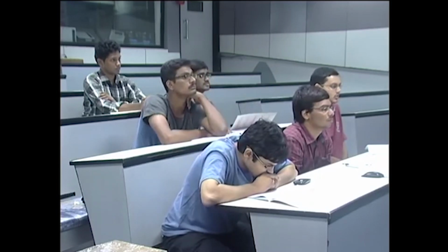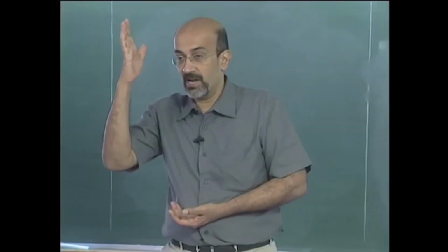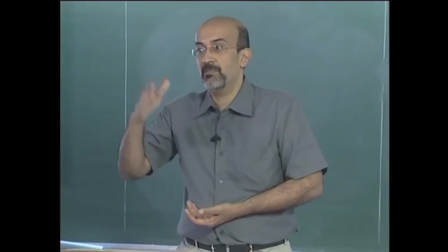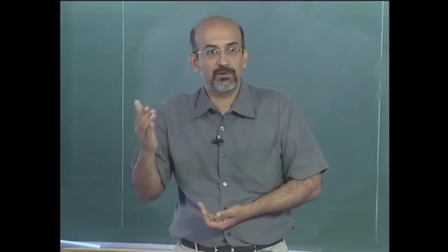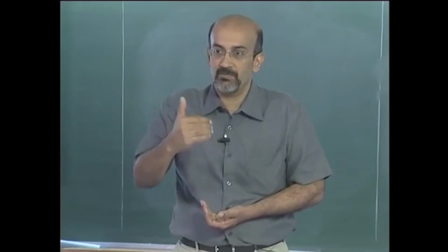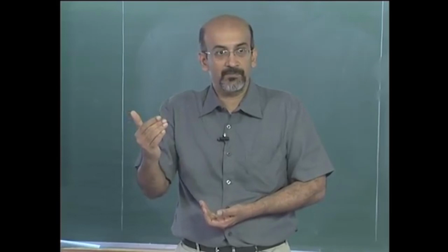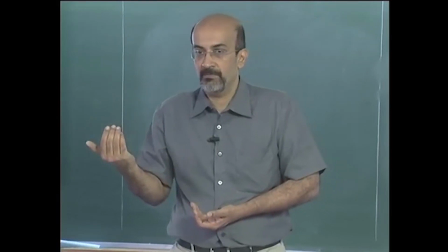Yeah, during the lecture. So as you get closer to the lecture, you are going to a level 5 schedule, it will be hourly. That means refreshment should arrive at a specific time, lecture should start at a specific time, should end at a specific time, the taxi should pick up the speaker at a specific time. It would be hourly or even to the minute.